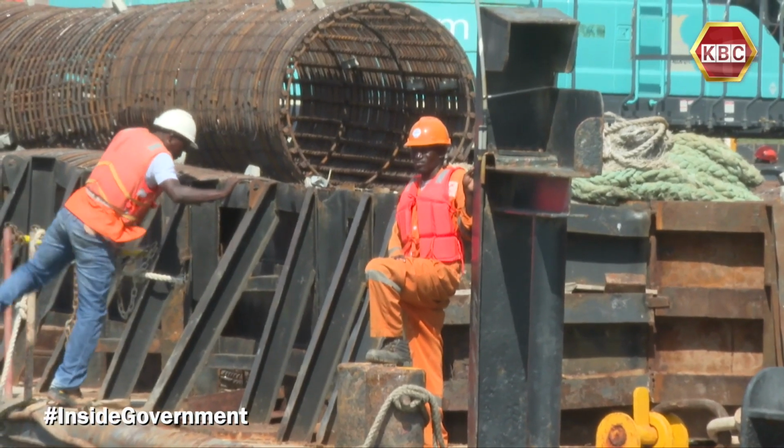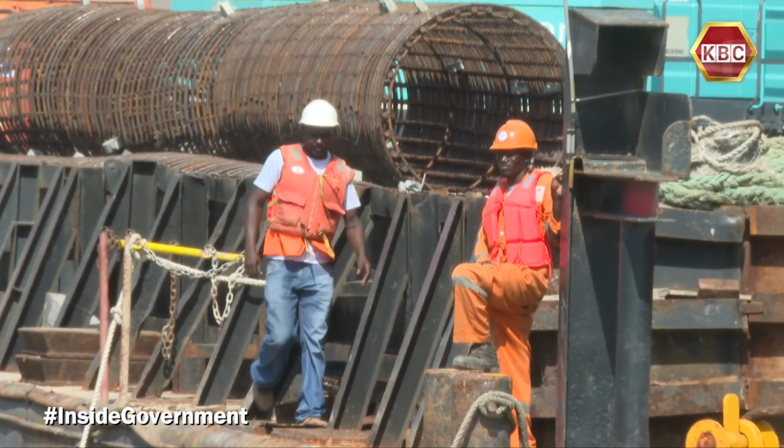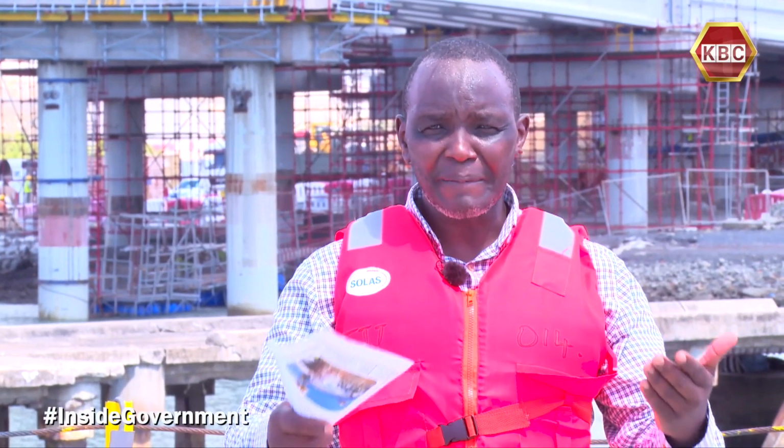Project to be commissioned? The project will be commissioned in March of 2024, and we are on schedule. As you can see, it's a lot of work. Doing all this, I think, and we are on schedule. We are at 40% progress level. So in the next 2-3 years, this project will be fully opened by March of 2024.